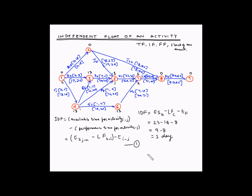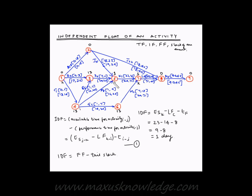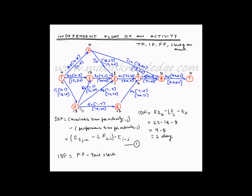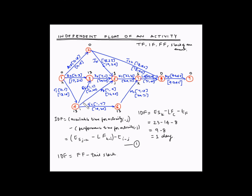There is another way of calculating the independent float: IDF equals free float minus tail slack. Tail slack is the slack of the event which is towards the tail of the arrow, as opposed to head slack which is the slack of the event touching the head of the arrow. In this case, the slack for event 4 is considered as the tail slack for activity F, but it is the head slack for activity C.